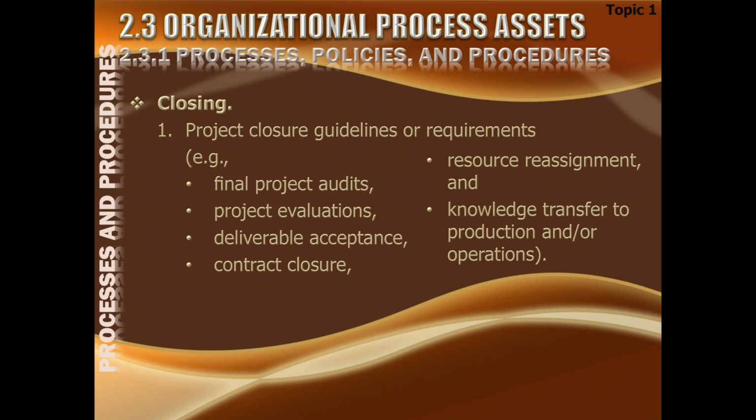In closing, the final project audits are conducted, project evaluations are carried out, deliverable acceptance is done, and if there were work contracts in it, then those must be closed. Next, resource management and knowledge transfer to production and operations.